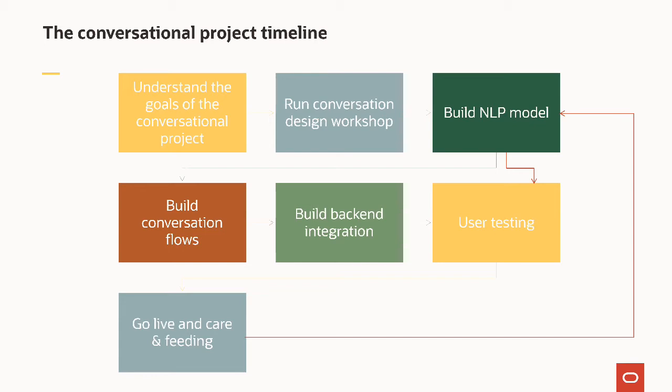And that brings us to the last step, which is again not unique to this type of project, but definitely has higher importance on a conversational AI project, which is the go live, especially the care and feeding, right? Once you release a chatbot to the public, you need to be on top of it. You need to analyze how the conversations are going. Are they being completed? Are the users dropping the conversation halfway? If yes, what's the reason?